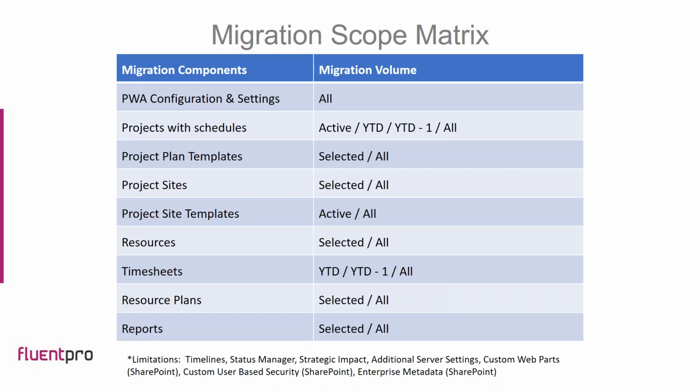With regards to site templates, it is important to remember about one of the limitations related to migration from Project Server 2010 to Project Online. Site templates from Project Server 2010 are not supported in Project Online due to the changes in the architecture. And such templates, they either need to be completely rebuilt in the new environment, or there is a workaround that FluentBooks provides for such migration.